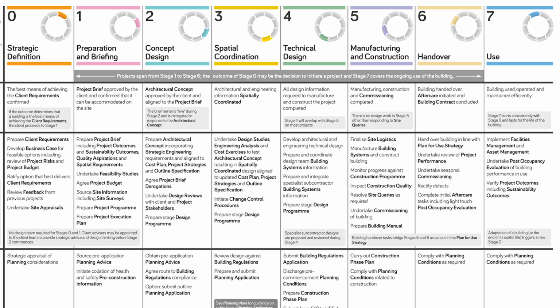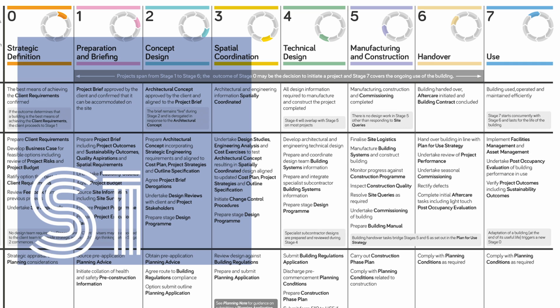Now, the way we translate the RIBA plan of works in our own work stages is by overlapping some of these thresholds in larger groups. So in Marcel's stages, we have S1, which is stage 1. S1 takes together RIBA stage 1, 2, and 3 to a certain extent. And stage 1 is more like an ongoing 3D briefing, really, that we create for our client.